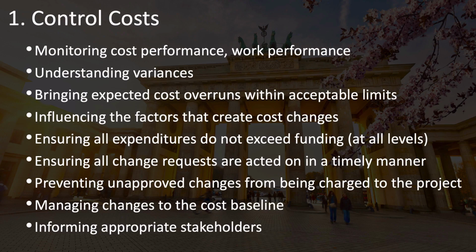The control costs process is also where you ensure that all change requests are acted on in a timely manner, interfacing with the monitor and control project work process and the perform integrated change control process to have change requests evaluated, reviewed, and either approved or rejected. If approved, the control costs process ensures that the changes are carried out, and those changes need to follow your configuration management plan.